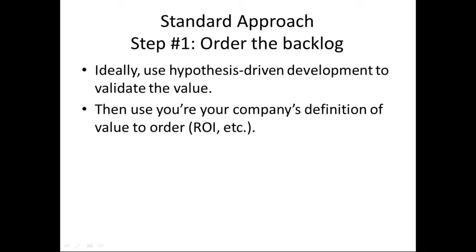So whenever you can get closer to the customer, right, get outside of the building, that's typically a good idea. And what people find repeatedly is that when they go outside of the building and they actually talk to a customer, instead of talking to people inside of the company, they discover that a lot of the things that they were planning on doing are not actually valued by the customer. So I've seen that in essentially every single case in which I've worked with a company on ordering their backlog.